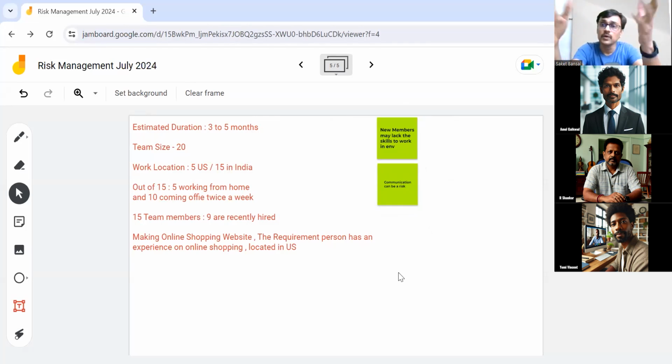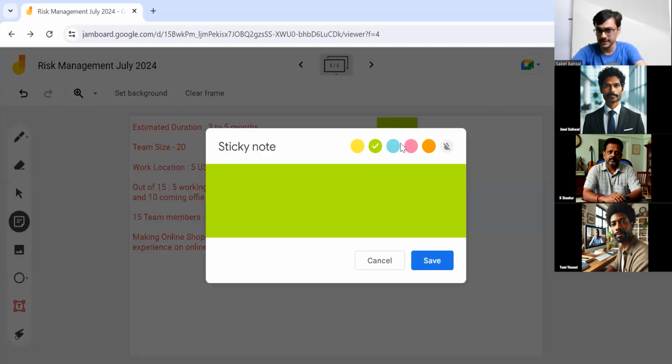We probably can look at a requirement document, whatever requirements are available. If we have access to it, we can see the overall product vision, whatever the product roadmap is. If the product vision and product roadmap talk about some uncertain requirements, some uncertain ideas, we may put a risk about it. So as a technique, we can say document analysis.